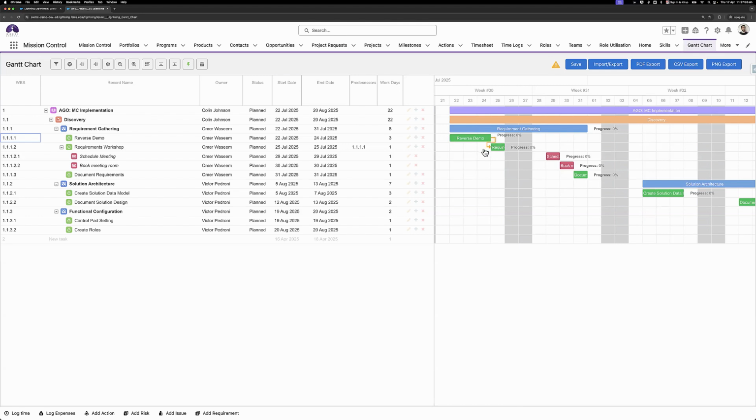action. So this is a finish to start relationship, where when the first action finishes, it's going to start the next action. So if this action gets delayed or moved ahead, the second action will also get moved ahead along with it. That's how you can create those dependencies, or you can set up the dependencies using the predecessor column here. If you know the work breakdown structure number here, you can assign that dependency there accordingly.